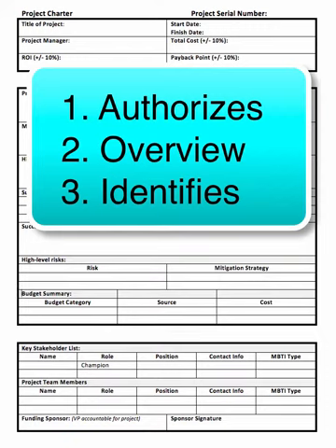The last thing it does, and you notice this at the bottom of the form, it identifies the main stakeholders. So at that point, it puts people on the committee, it assigns people different tasks, it actually staffs the HR portion of the project itself. It'll also include the name of the project owner or the project sponsor who's going to fund it, and it'll address the goals and the objectives. For the first time, it'll address things like risk and a detailed budget. So there's a lot here.